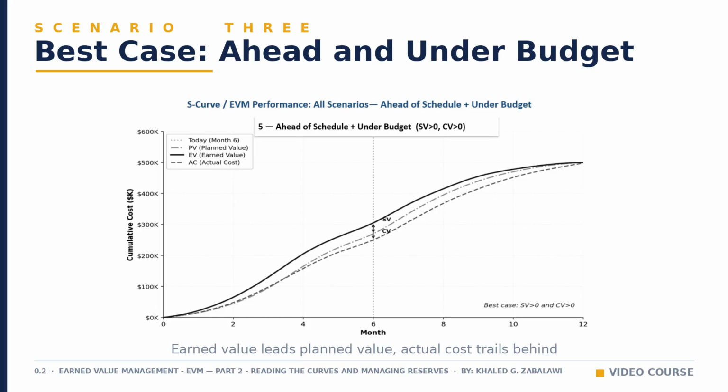That work is costing less than its earned value, so every dollar spent is returning more than $1 in progress. This is the pattern every sponsor wants to see on a status report. It usually reflects strong estimating, an efficient team, or some combination of both, and it gives you room to absorb minor surprises later without breaking the budget.